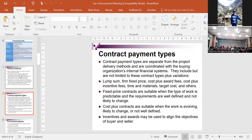In contract planning, we decide two basic questions. First, what will be the strategy to deliver the project - will you engage a project manager who will make the BOQs and tenders, or will your own team do it? Second, the payment mode - will it be cost-plus, lump sum, or based on man-months? The most common delivery strategy is design-bid-build, in which we design first through a consultant, develop the BOQs, invite tenders from contractors, and decide based on evaluation criteria who is the best contractor.